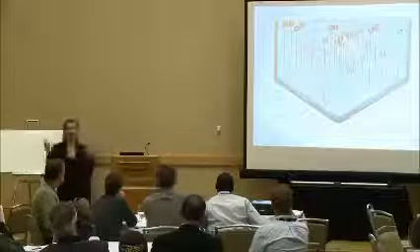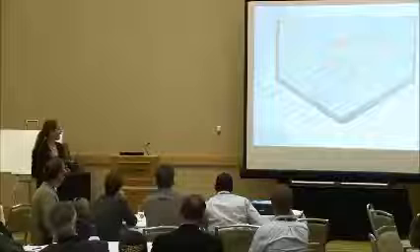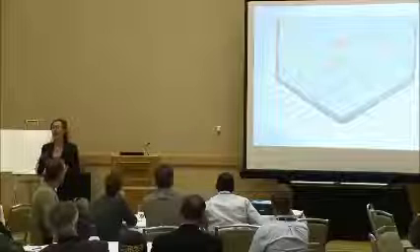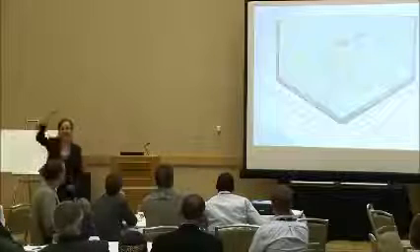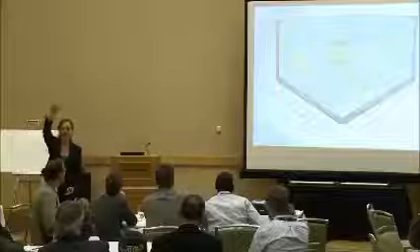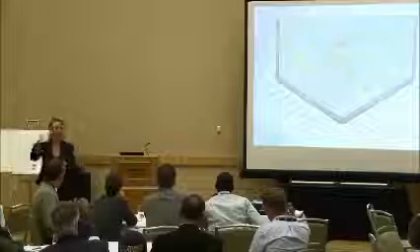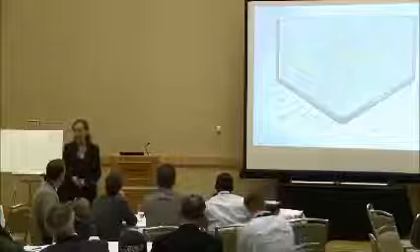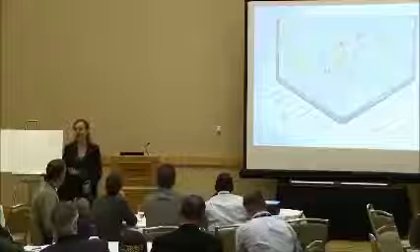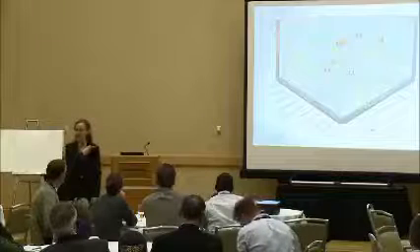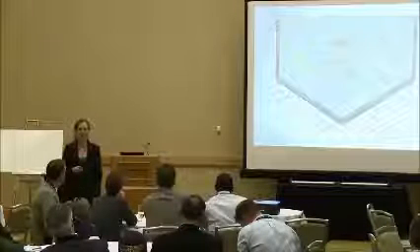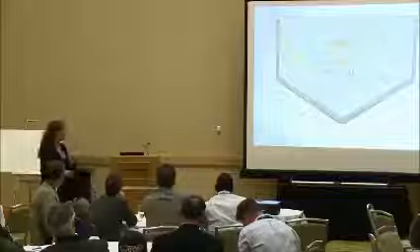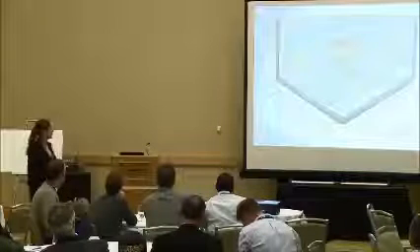Now that's the current risk profile, and then that is the forecast risk reduction, and there's actually a list of jobs that go with that to say if you implement all these things, we have a certain level of certainty that you'll be able to reduce the risk to this, and here's the backing and the evidence and justification for it. So my question would be, how long is that going to take and how much is it going to cost, and how can we allocate those jobs to people? Okay, so you can actually track it. It's a pictorial diagram for that.